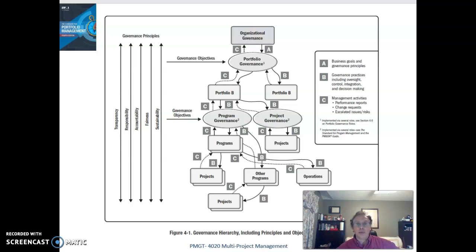Capacity planning aligns portfolio components to the available human capacity. As I said, this is one of the hardest areas in portfolio management due to the inaccuracy of estimating. Projects and programs that have not even started yet usually have a high-level estimate known as an analogous estimate that may over or understate the component's true need.